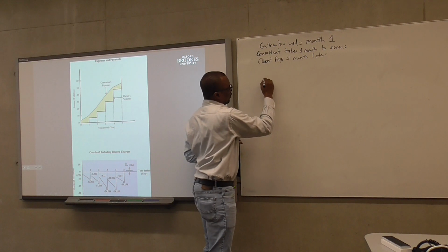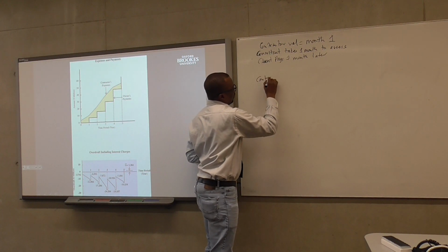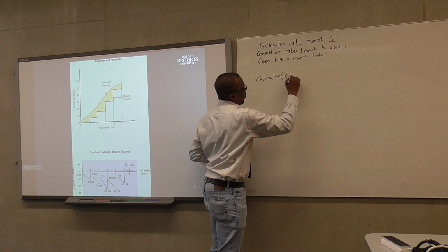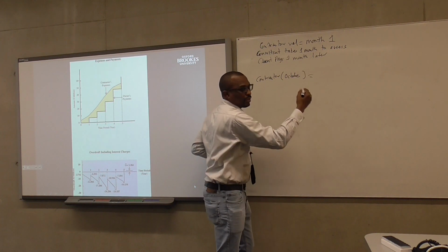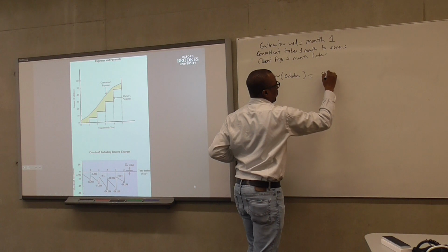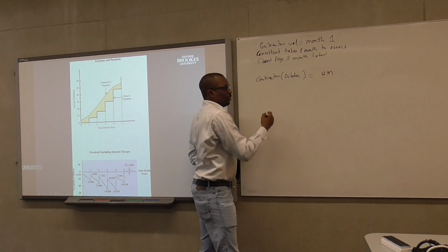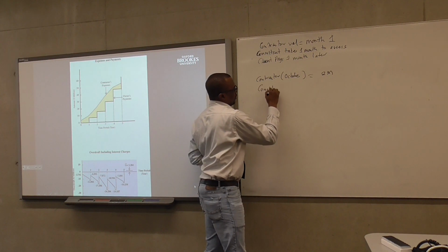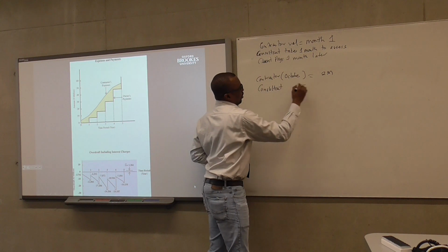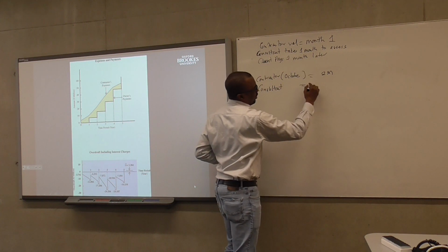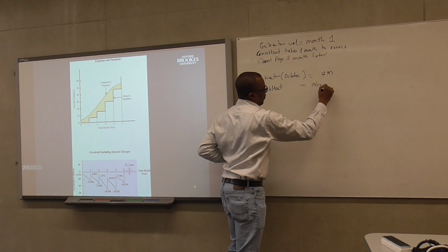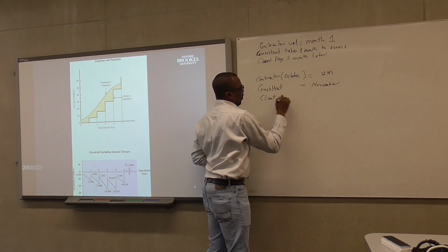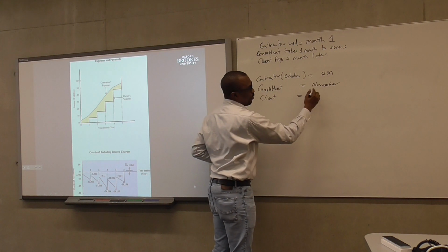It means, let's assume the contractor submits, we are in October, right? The contractor has worked to the tune of, let's say, £2 million, right? It means the consultant is most likely to finish the assessment in November. And then the client, 1 month later from November, will be December.